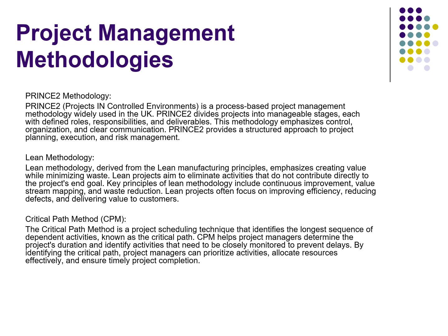Critical Path Method, CPM. The Critical Path Method is a project scheduling technique that identifies the longest sequence of dependent activities, known as the critical path. CPM helps project managers determine the project's duration and identify activities that need to be closely monitored to prevent delays. By identifying the critical path, project managers can prioritize activities, allocate resources effectively, and ensure timely project completion.